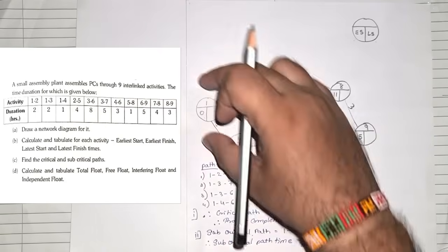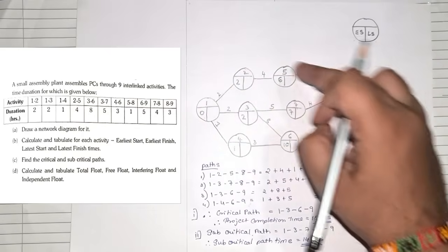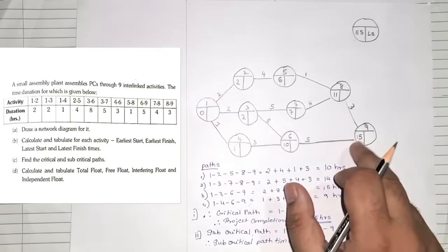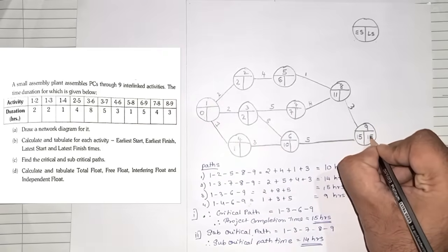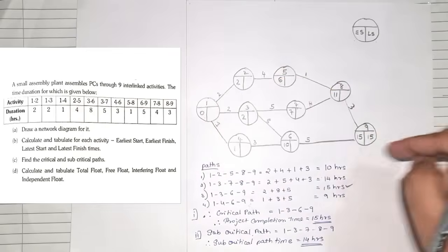Okay, always remember, whenever you're going from left to right, whenever there is a merger, always the higher value among the two will be taken. Now, once you're done with that, whatever is the last value, that will become the last time. And now we have to go in reverse, backward order. So we'll have to go backwards. So let us start with the top part first.